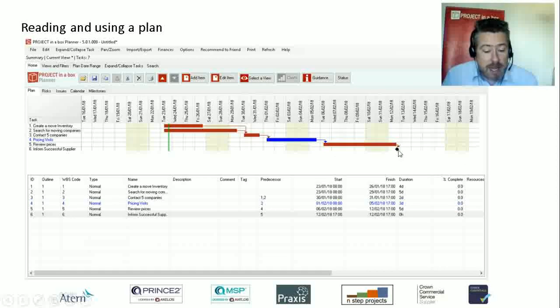The next thing we've got here is a milestone, and a milestone is an indicator that you're a certain way through the project. It comes from the milestones that stand at the side of the road that mark we're halfway down this particular road, or halfway between one town and another. And so you can set up milestones. They have, in planning convention, 0 duration, so they can be set to not affect the percentage complete of your project. We'll talk about that later, but they are marking something, and a black diamond is the normal indicator for that. So here I've got, we've informed the successful supplier. That's the end of the supplier selection.